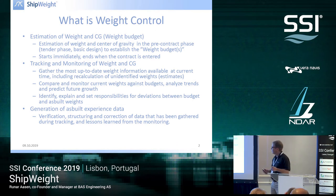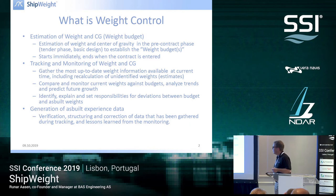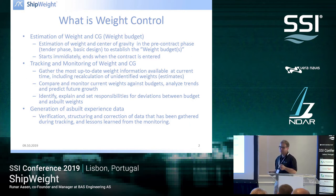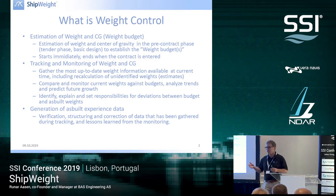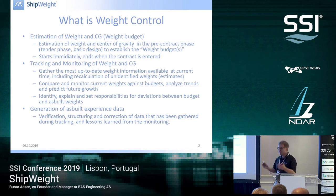The second phase is tracking and monitoring, which means gathering the most up-to-date weight information available at the current time, including recalculation on identified weights and estimates. After you enter the contract, you're doing follow-up and tracking. Even if you are still doing estimating, we don't care about the method you're using — you're in the tracking phase because you have a weight budget that you're now following up against.